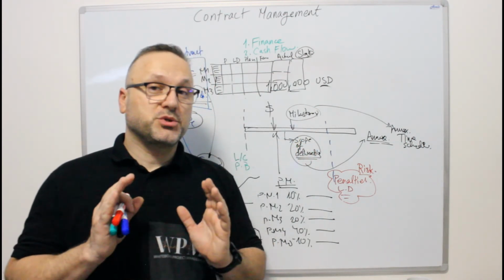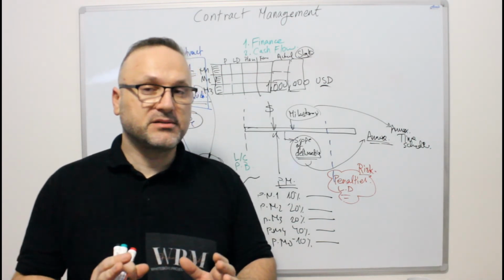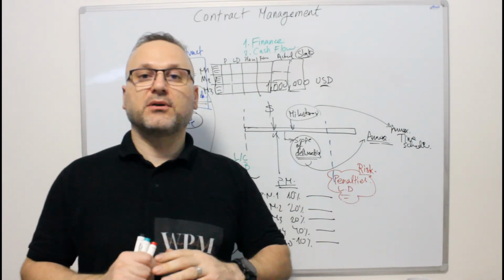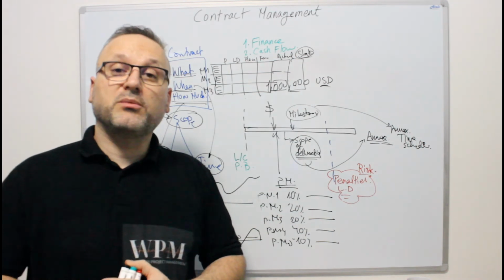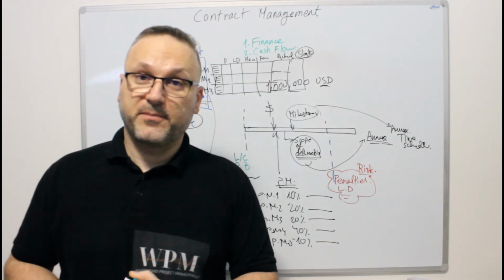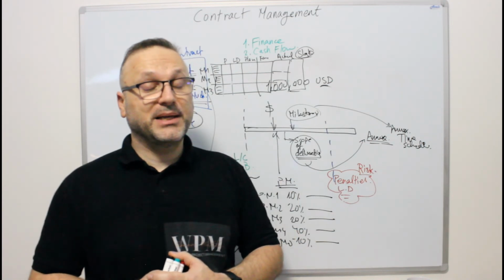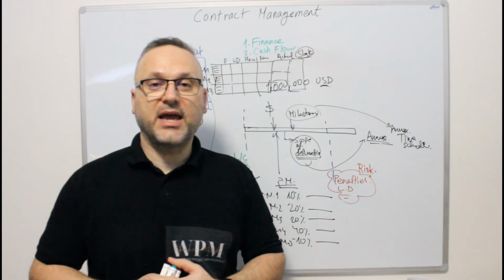It means you send it with an official letter, signed and stamped on your company letterhead. This will be the official way. Always when you send it by email, request: kindly confirm receiving the attached letter.